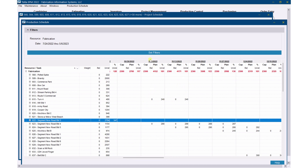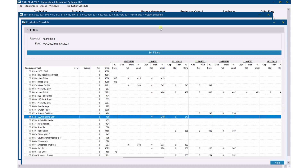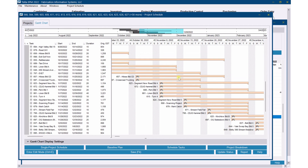If I want to know what jobs that is — let's look at November 6th here. I can scroll down through here and see which jobs are affecting me in that week. We've got some showing up: 492 hours, 607, 415. I can scroll down and see which projects those are. Sometimes it's nice to come over here though — let's go to November, week of November 6th, and scroll down. This is a little bit easier to see. I've got this project which is 4,245 hours of estimated hours running through that week. I can see what the big jobs are affecting me and see if we can shift some of this around. I get a really good idea of what I need to do.